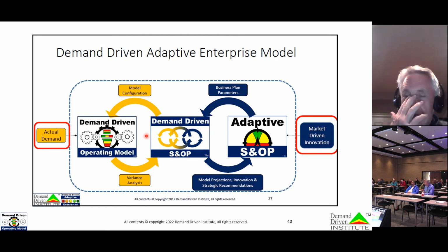collaboration with your suppliers where you say, tell me the rate I can get on a monthly basis. What can you give me so that I don't have to think that I'm going to gain an advantage by now going from a 30-day lead time to a 120-day lead time? Or I've seen companies seeing 360 days quoted. Are you saying you're not going to produce anything for me, Mr. Supplier, for the next 360 days?